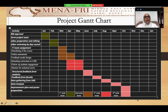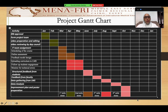Afterwards, we will start the third phase, which is the closure phase, in which we collect data from students and from the staff in the form of feedback. We also collect data from the LMS for the number of views of the videos and the number of logins. After gathering this data, the data will be analyzed, and then we will see if the project or this way of teaching has improved the outcome for students.